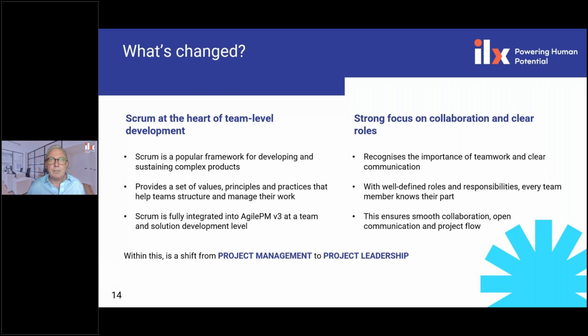Scrum doesn't have a project manager, as I mentioned. In fact, there is no manager within a Scrum team. What they've actually done is taken the Scrum Master and product owner. They've actually taken what could be a manager and split them in two. One half of the manager's job being making sure that people know what to do. The other is having a way of working. And by splitting the two, it avoids having a vertical hierarchy, creating a team that can collaborate and work together better.